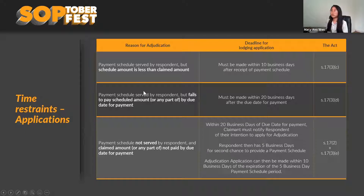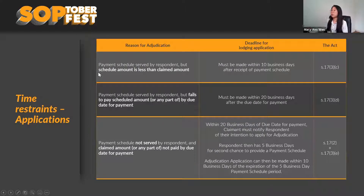The purpose of the Act is to facilitate quick payment for contractors, so failure to comply with time constraints may affect your ability to lodge an adjudication application. Running through the three scenarios: if a payment schedule has been served and it's less than the claimed amount, you must lodge your application within 10 business days after you receive the payment schedule.